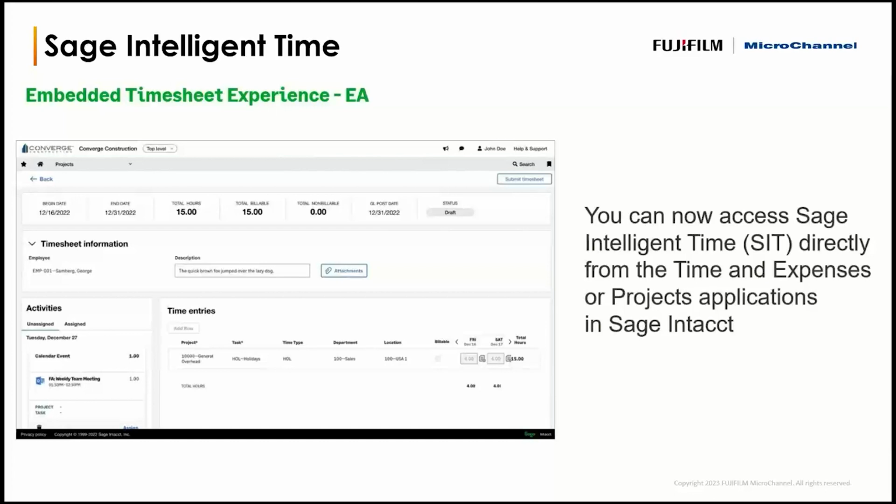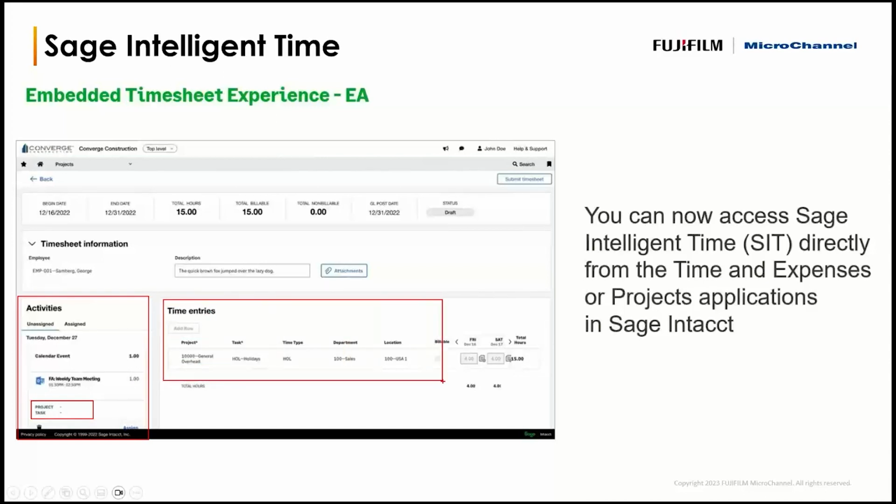So it's integration to Outlook, and what you've got available is looking at examples like this. There are activities from your calendar events where we can say, there's a project meeting that happened there. You can physically assign a project and a task to that, and that will drive the timesheet entry for you. So it'll nominate, or you can drag and drop activities from that Outlook interface effectively as timesheet entries. So that's there, that's currently available.